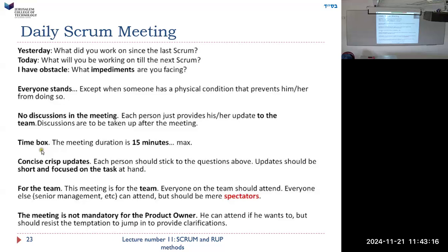In the meeting, we want the meeting to be 15 minutes, time boxed. 15 minutes at maximum. So we're not going to have a discussion. Also, if a person says he didn't finish his work, when I say, why didn't you finish your work? Well, we can say, well, you had obstacles. But we can't start criticizing him; he can have a meeting later with his manager. Concise, crisp updates: each person should stick to the questions above, and updates should be short, focused on the task at hand.